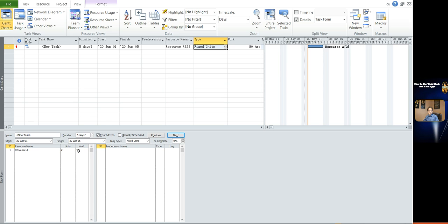Now, during the project, there is a design change, and 80 working hours is not enough. You estimated you need 160 hours totally for the task. And you cannot increase the resource due to resource availability. So how will the duration be changed? In this case, number of the crew member per day is fixed. So you only have 2 people per day.